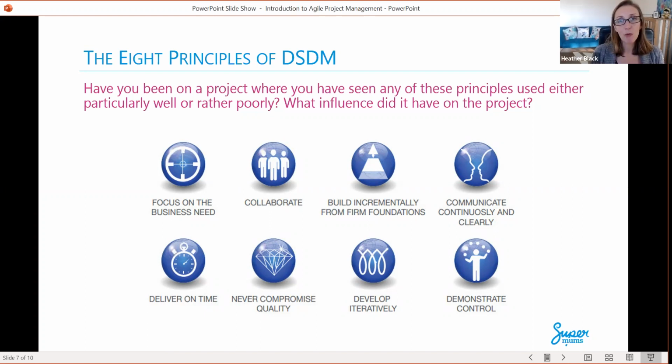And ultimately, the Agile manager needs to demonstrate control. Like the client has a specific budget. So when you're talking about features and priorities, you have to agree, okay, well, we can deliver X, Y, Z within this budget. And you need to then talk about how much budget's been used. And when you're discussing the next iterative development, to talk through, well, okay, we've got this much budget left. What are we going to focus that on? And you keep working through that budget, making sure that budget is spent on priority features, developed to a quality that is acceptable before you move on to the next set of features and developing it through.